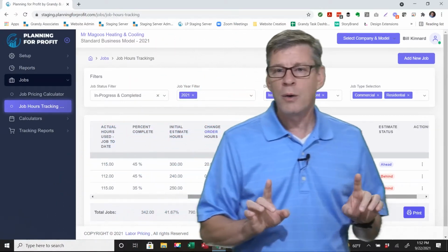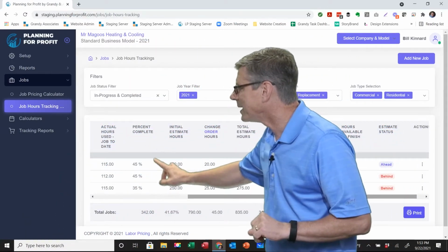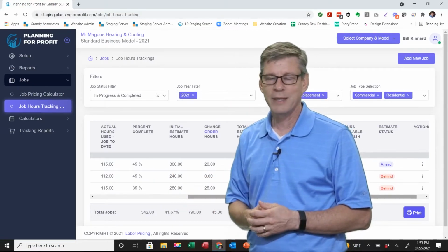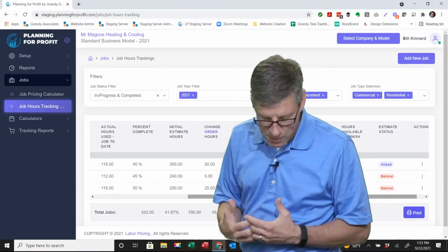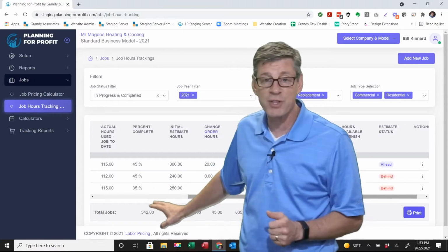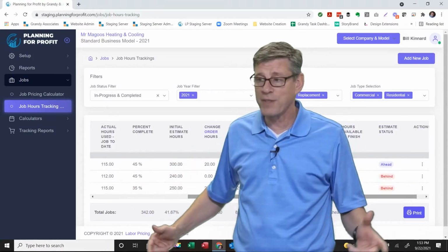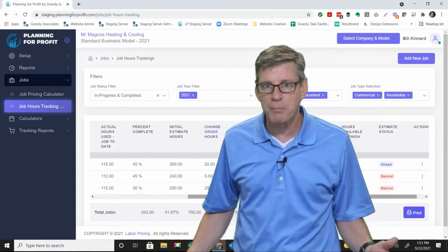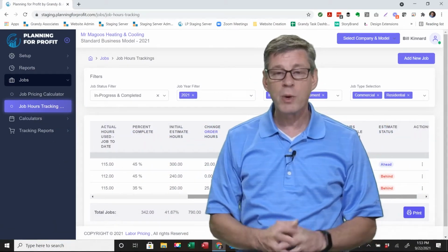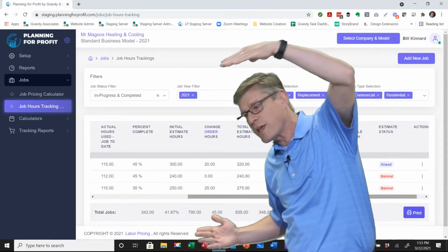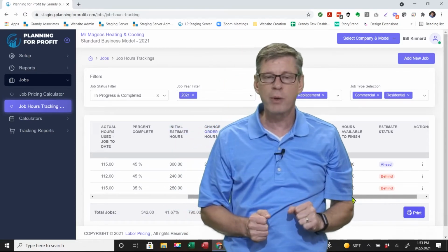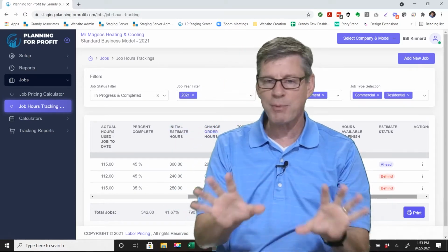Number one, right, when they see this percentage complete, they're going, yeah, who said we're 35%? Again, think about that for a moment. How accurate is that estimate going to be the first half of the job? Well, not very. If they say we're 5% completed or 10% completed, there could be a fair amount of swing in there. But realistically, as we get closer and closer to the end of that job, that projection is going to get more and more accurate as we go through. And as long as a team we're in agreement, I'm comfortable changing it.